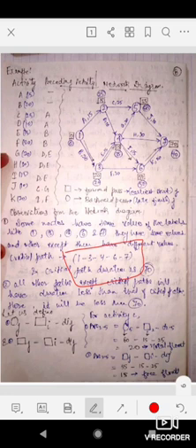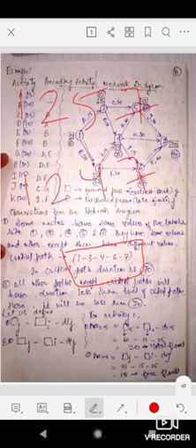And what about non-critical paths? I will write here non-critical path 1, 2, 5, 7. It is one of the non-critical paths. 1, 2, 4, 7 is also a non-critical path. 1, 3, 4, 5, 7 is also a non-critical path. So there can be many non-critical paths. Those non-critical paths are the paths which you can delay. If you delay those paths, they will not affect the duration of the completion of the project. But for the critical path, if you delay critical activities of the critical path, then your project will be delayed.